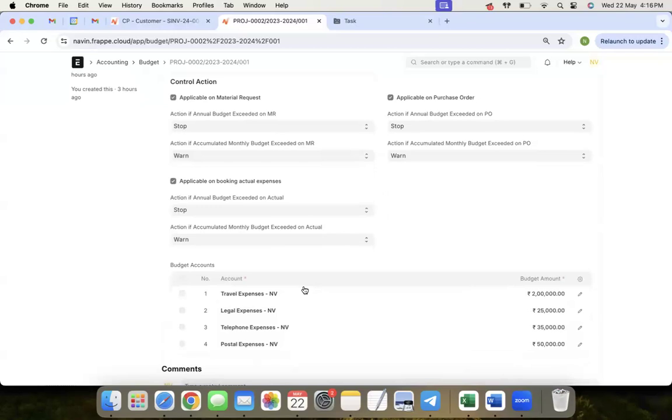Because it might be the currency fluctuation, or the reason could be anything, or it might be that the junior resources left the organization, and while hiring the new resources, they are experienced and quite expensive. So in that case, your budget is going to exceed whatever you planned at the initial of this project, right? So you can modify it before doing that transaction.